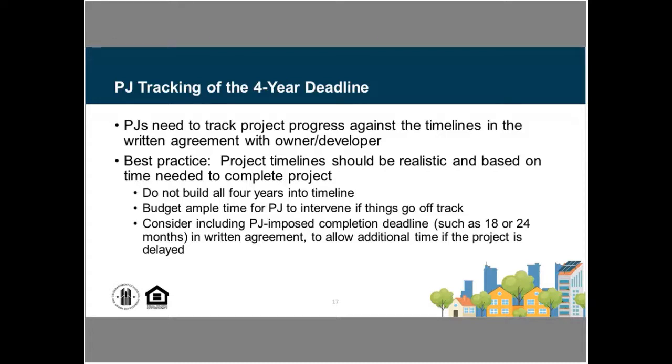And so we were never worrying that we were going to be threatened with that 4-year project deadline, and we were watching those projects to make sure, if there begins to be slippage, if we've given them a shorter deadline than the 4-year time period, that gives us some time to work with that project, get things straightened out, and get that project completed on time.